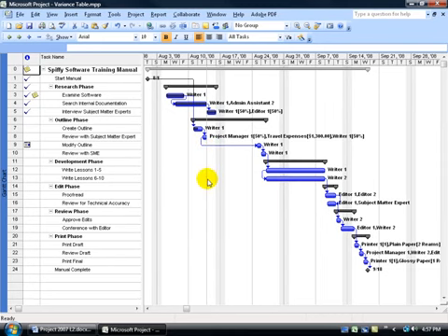When I click OK, you'll notice that the current date is indicated here on the gray line in the Gantt chart, which is nice because I can look at that and see the tasks behind it if they're completed or not. But more importantly, if I go ahead and add the progress line to the chart that's based upon the current date, that red line is going to peek over to the left on any task that's behind schedule or that hasn't been finished by the current date.